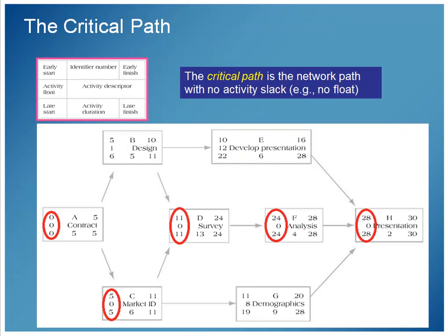At this point, now that the network node is complete, we are ready to determine the critical path for this activity network. And the critical path, by definition, is the network path from start to finish where there's no slack. And I can look, starting at the beginning, there's no slack at the beginning, and there always will be no slack at the beginning.